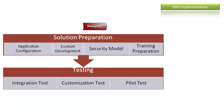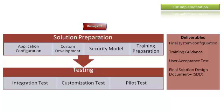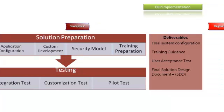A pilot test — a full end-to-end cycle test — is conducted. The outputs of the Development phase include the final system configuration, training guidance containing modifications in business processes for certain roles, user acceptance test scenarios to be used in the Deployment phase, and the final Solution Design Document, which is a very important document.